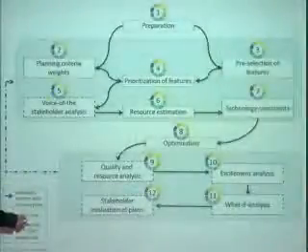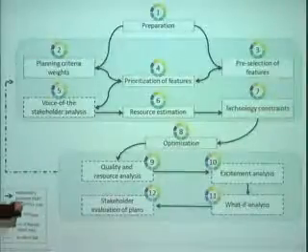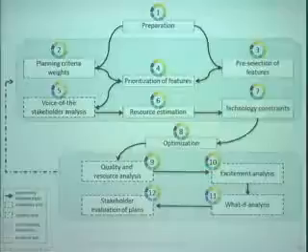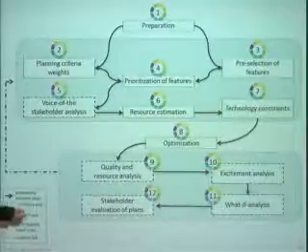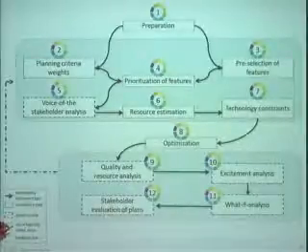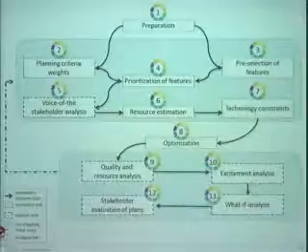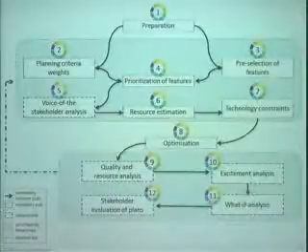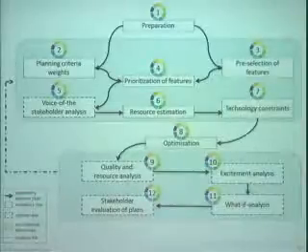We see that, as a result of this process, there is not only one plan generated. We have a portfolio of optimized plans, and which one of them, if any of them, is really recommended. So that's something where we perform this quality analysis, the sensitivity analysis. We do some what-ifs. What is the degree of change if we re-weight our criteria?